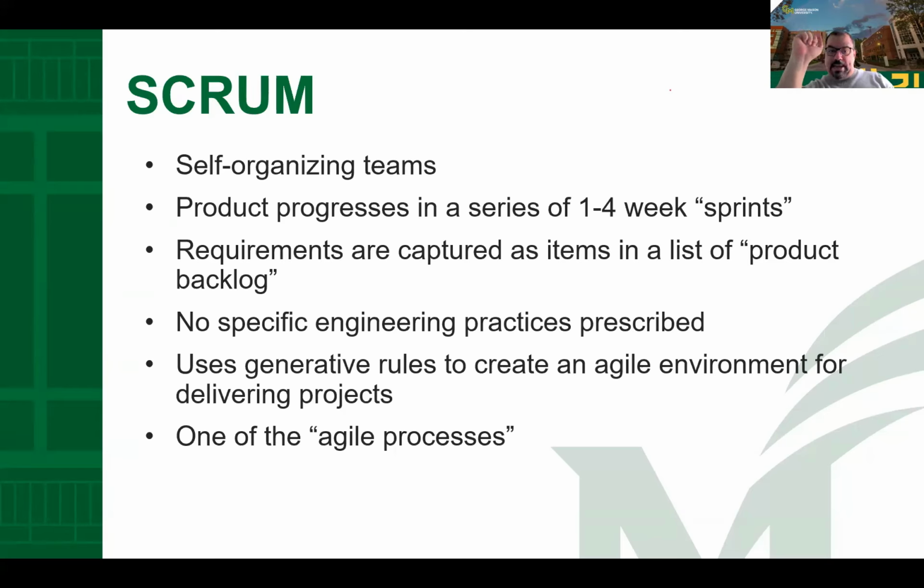The most important thing the Scrum is you see the progress in series of 1 to 4 weeks. The most common is 2 weeks. Each 2 weeks, you have what is called the done software or the done system. What's the done system? The done system is a system that is documented.